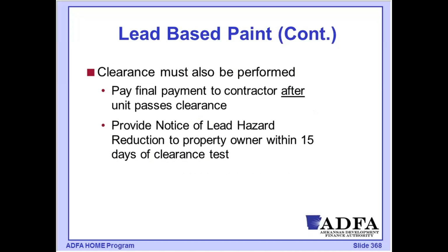So they're usually a wipe test that then is sent to a laboratory, and they're testing for bits of lead and that concentration to determine whether it is acceptable or not.